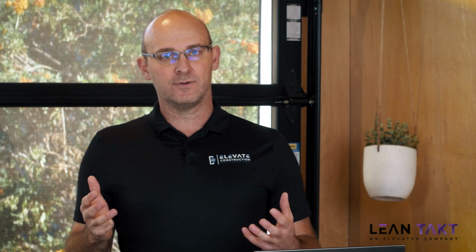We call these the afternoon foreman huddles. There's a very specific reason to have them in the afternoon. Please look into it. It is better to set up the day before than the morning of. We highly recommend that you do this. In the afternoon foreman huddle, you are creating the day plan and filtering from the weekly work plan any of the information that you need to focus on, like handoffs and interfaces, and you're making sure that every day you, with the trades, are removing roadblocks and you're minimizing constraints.